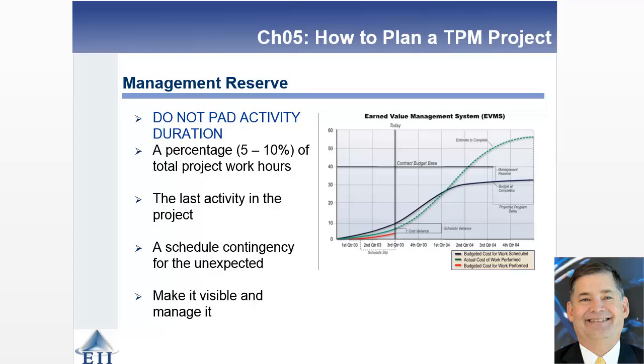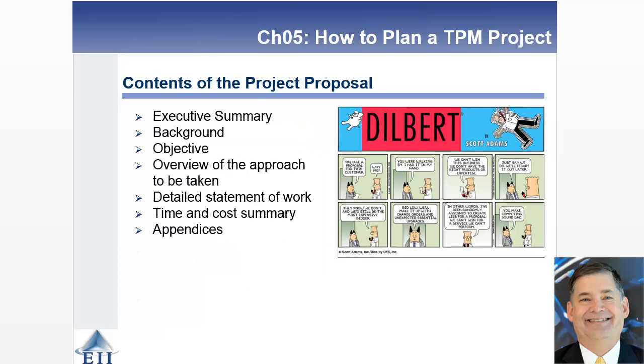But that managerial reserve is how much money do you have in the budget versus the budget at completion. You've added some time in or some money in there, and you have to make it visible, and you have to manage it actively. And you're making it visible because it's not infinite. You don't have an infinite amount of additions that can be made, and you can't fall behind in what you're trying to do in the particular project. So that managerial reserve allows you to address a component of that within your existing budget.